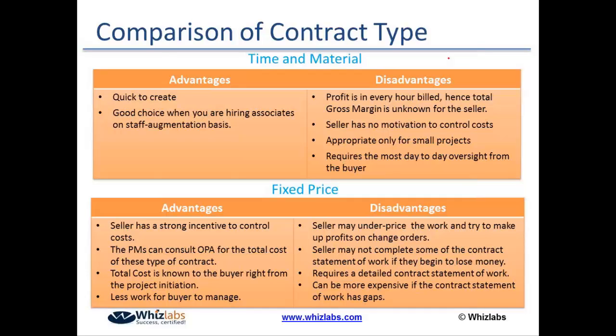I would charge you extra for this. Right. So if my statement of work doesn't have the nitty-gritty of the scope, then I'm exposing myself to the risk that the seller would find out the gap, consider it as a change request, and say that this was not included in the base price and would raise a change request on a paid basis.